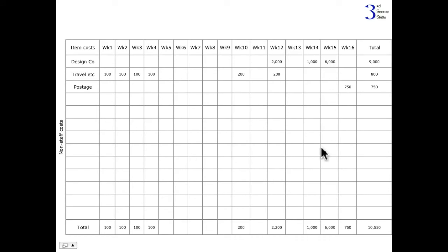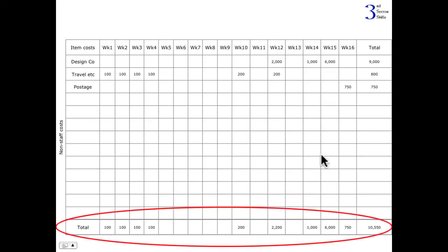So again, what we have is the totals, £10,500 roughly, of money we actually have to write cheques for, and again an idea of when they're coming in. Not much coming out at the beginning. It's very heavily weighted towards the end of the project, which you'd expect. So there we have the expenditure.